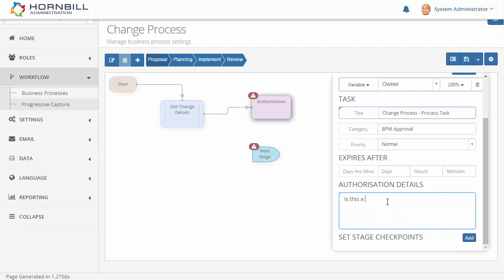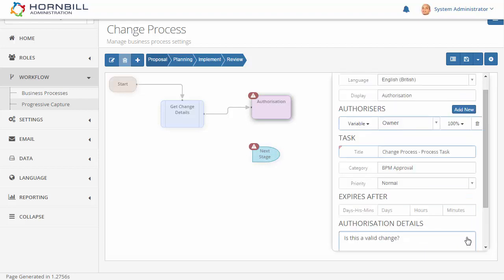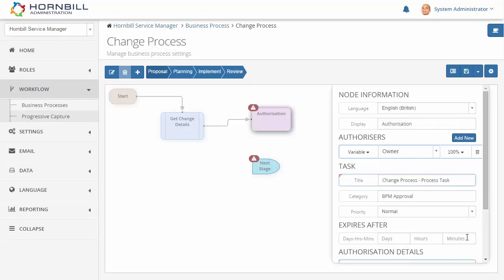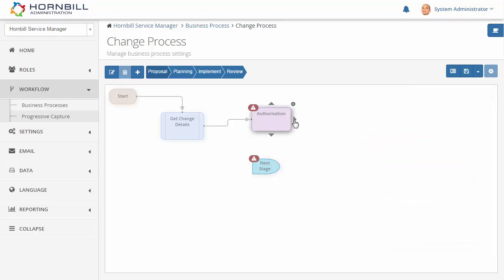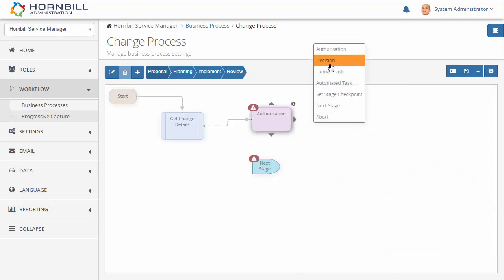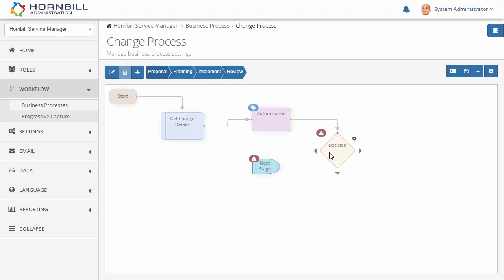Once we've defined the authorization node, we can now draw out from this node to add our decision node. In the first decision I'll bring this to go to our next planning stage if the outcome is approved.